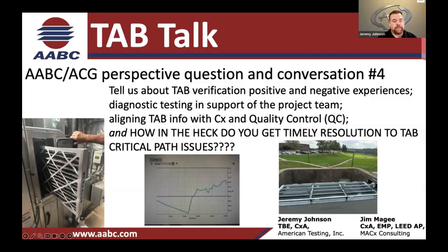And this is like, Jim, when we talked about it in our rehearsal, sometimes there's a real narrow window of opportunity to really TAB verify the system, because a lot of times, when the TAB guy is going through his processes and setting up total air on a unit, that unit may never see that condition ever again, or you might have to jump through a tremendous amount of hoops to get it in that place.